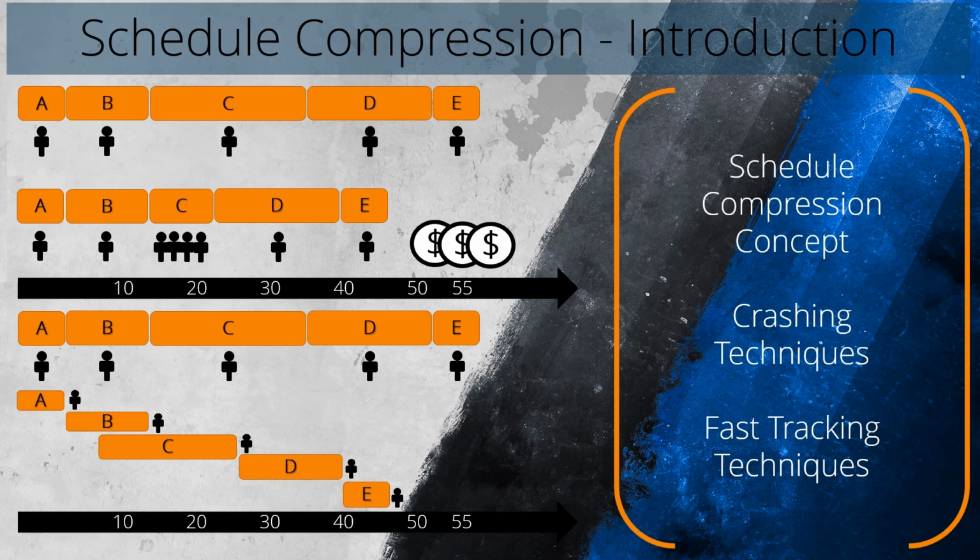The project manager ensures that front-end and back-end development activities within activity C are performed concurrently. This reduces the total duration of the development phase by eliminating the wait time between these subtasks. As a result of these schedule compression efforts, the project manager successfully reduces the project duration from the original 55 days to 45 days, meeting the revised deadline.